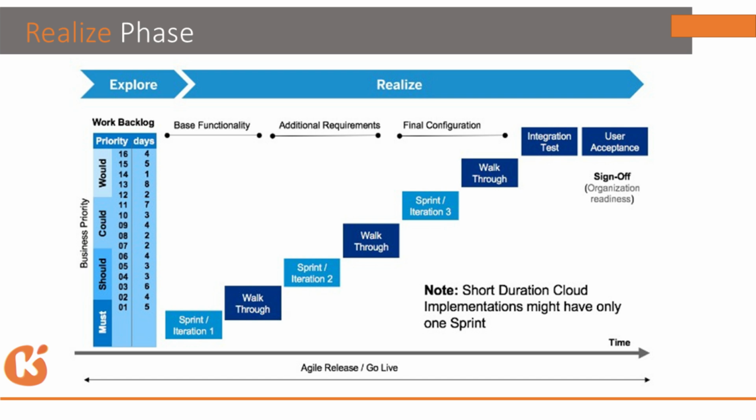Once the first iteration is completed, whatever you created, company structure, person structure, employee wage type structure, everything, you have to have a demo with the client saying that, customer, we have created this company, we created this many locations, personnel area, personnel subarea, employee group, employee subgroup, wage type. Just let me know, is there any deviation on that? The client will see the demo, and again he will give feedback.